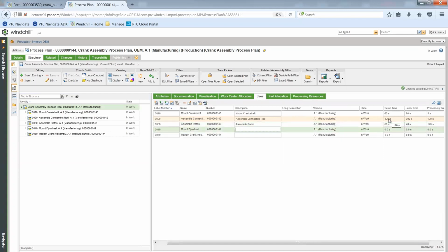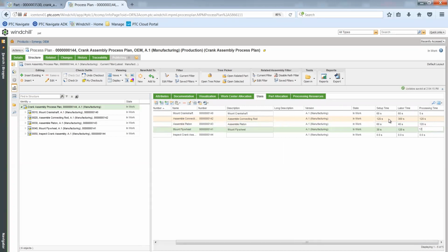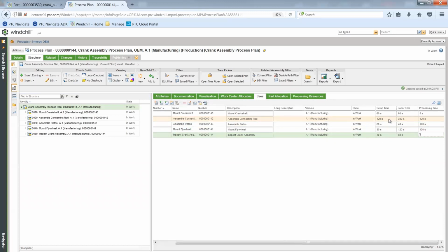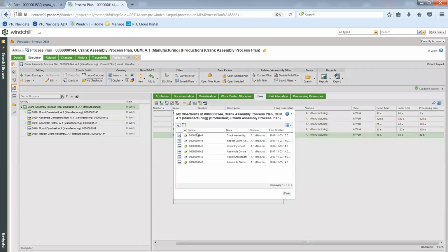The benefit of that is then if something goes wrong, or maybe they've even completed this multiple times and they're always behind schedule on step 3, then that's something that they know, they're not aligning with engineering in planning or whoever sets this up. So then that's information they can relay, and you can figure out what the problem is and say, all right, if step 3 is taking 4 times as long as what we expect, and it's that way for everybody, then this is something we need to look at from a planning standpoint. It's not necessarily just an assembler's fault.